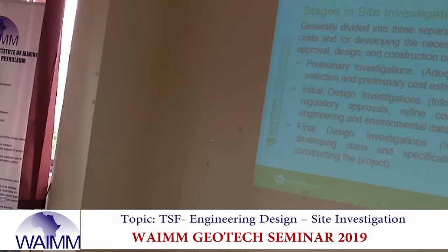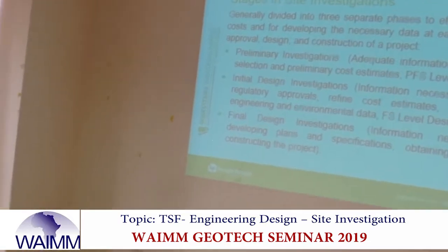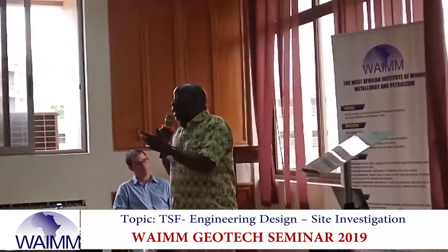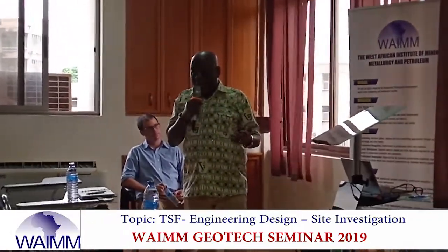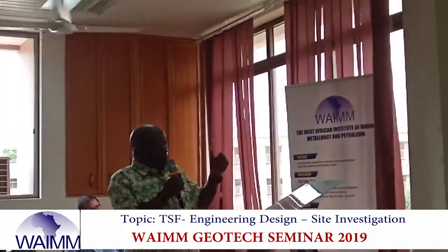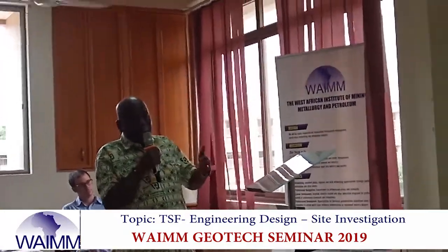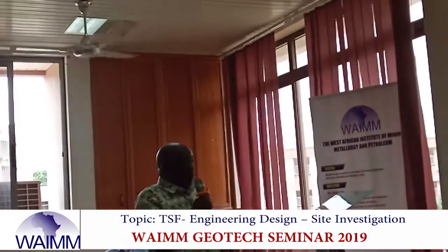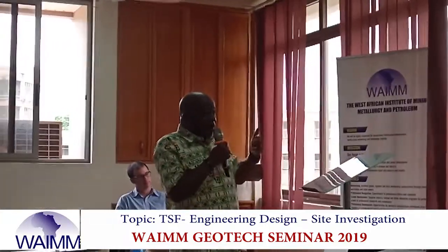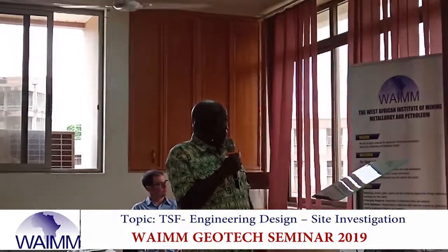Jeff was talking about the different phases in the engineering design. We have the pre-feasibility, the feasibility, and the detailed feasibility design. So in the geotechnical investigation too, we have it in stages. We have the preliminary investigation, the initial design investigation, and the final design investigation.